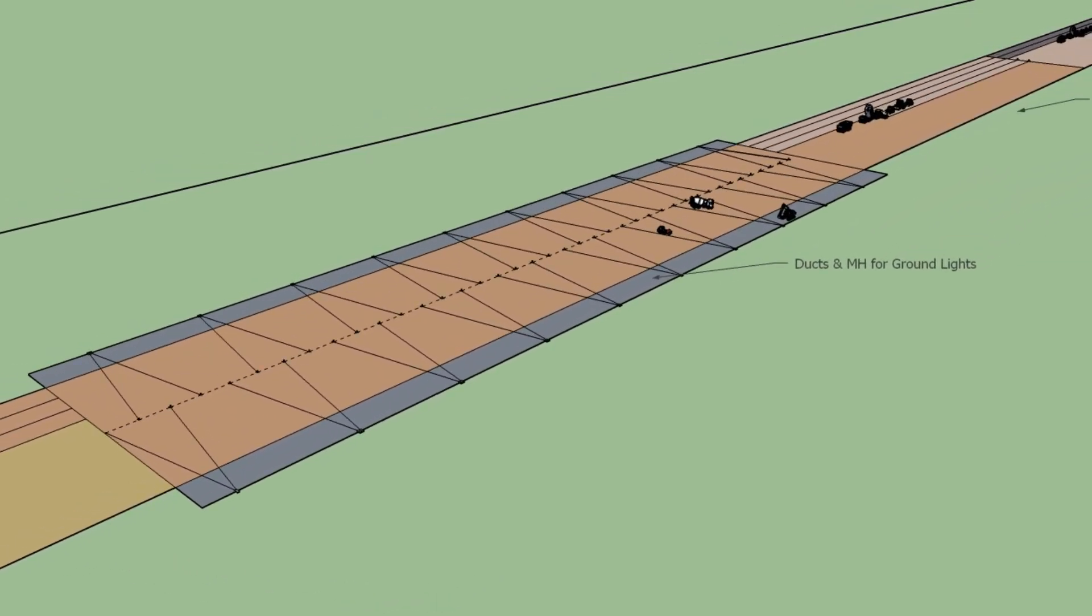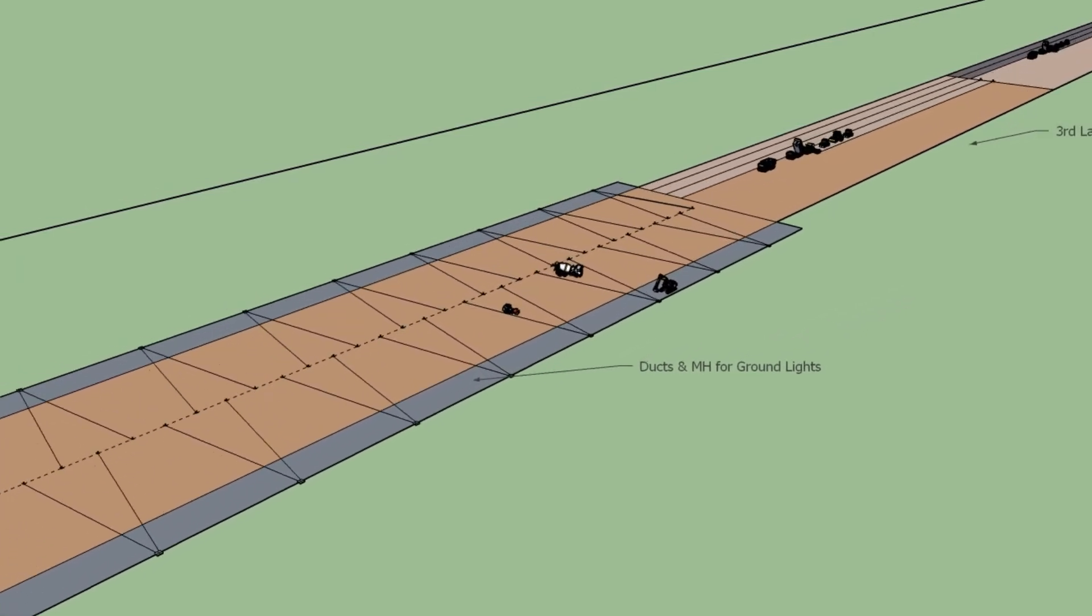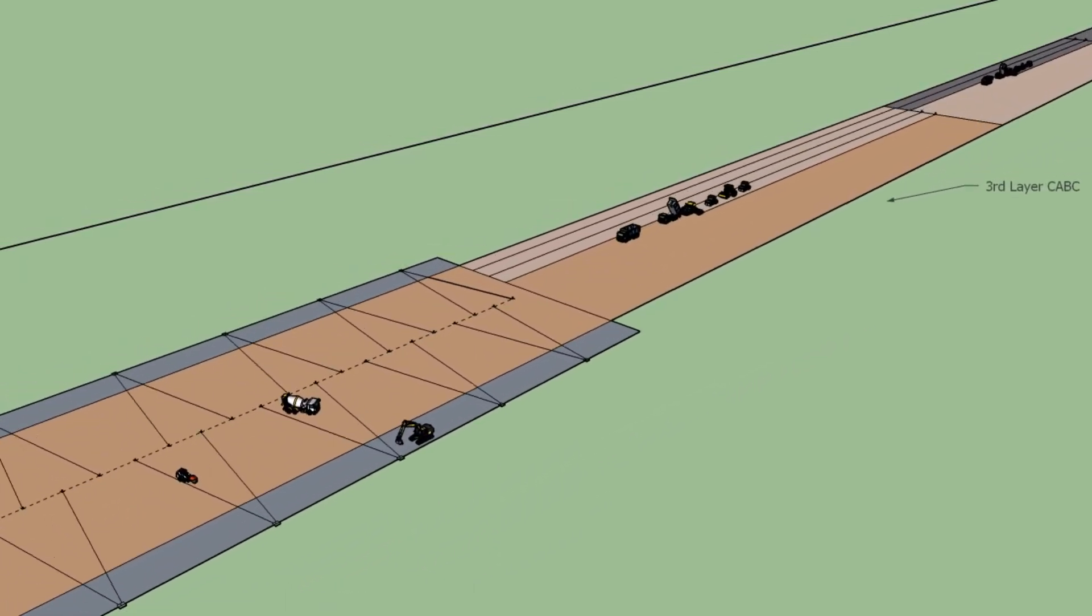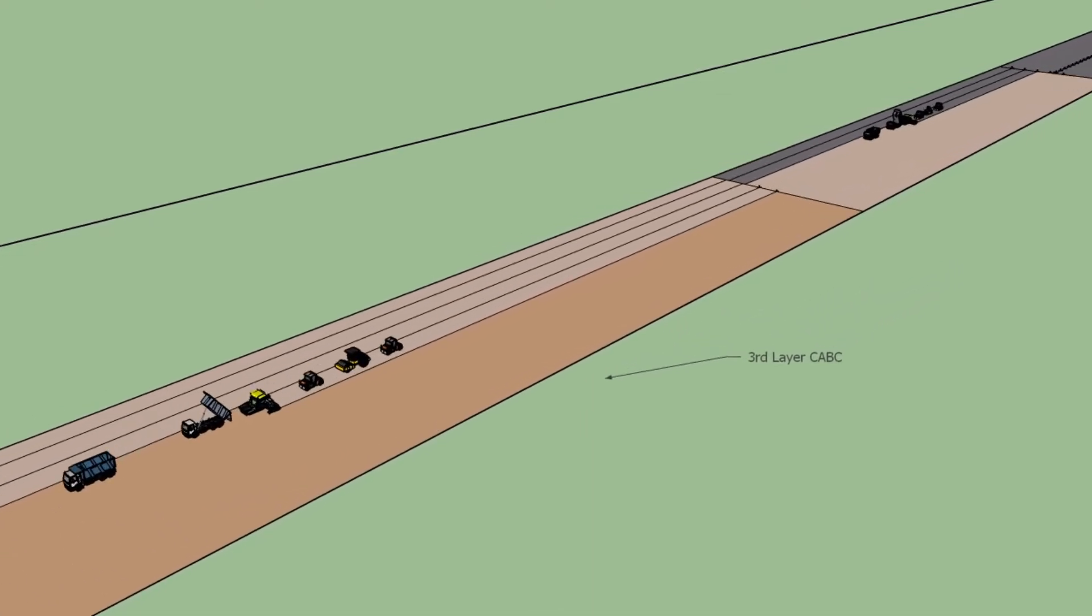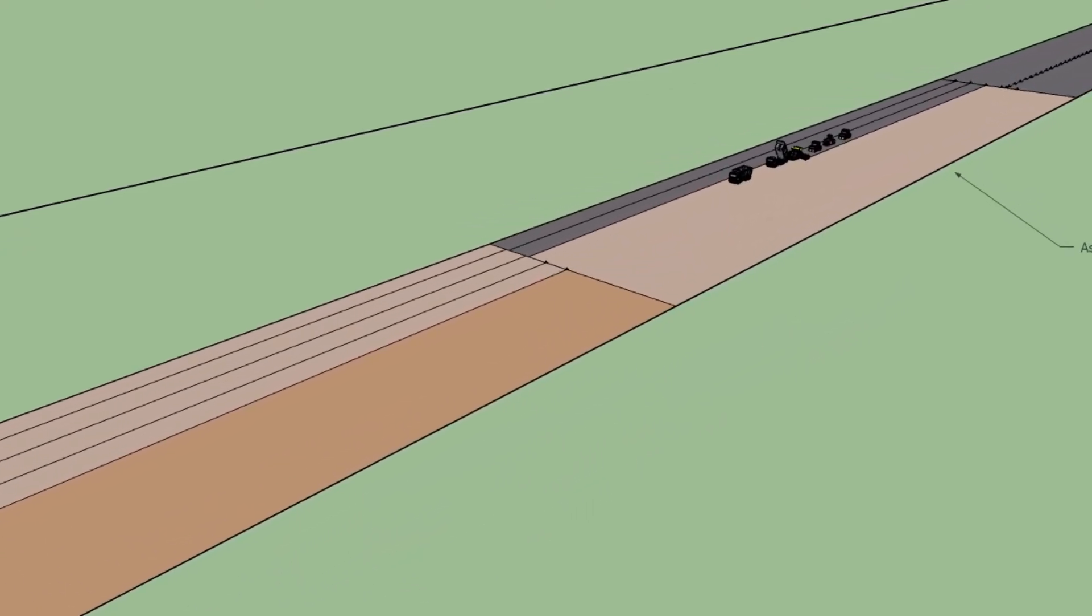Excavate and place ducts and precast concrete manholes for the ground lights. Lay and compact the third layer of crushed aggregate base course.